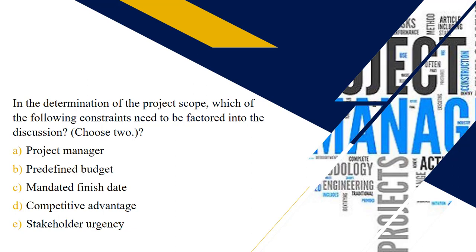In the determination of the project scope, which of the following constraints needs to be factored into the discussion? Select two from this list. Hopefully you selected B and C. Two of the triple constraints are represented: a predefined budget and a fixed or mandated finish date. These constraints will impact the options available in terms of scope and should be considered when creating the scope statement.